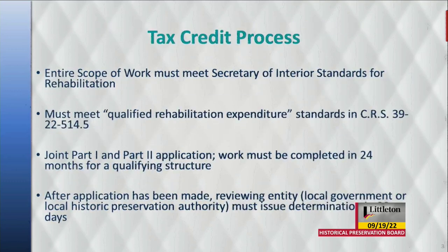In terms of the process, the entire scope of work must meet the Secretary of Interior standards for rehabilitation, and it must meet the qualified rehabilitation expenditure standards. And as I mentioned, this is a joint Part 1 and Part 2 application, and as part of the program rules, the entire project needs to be completed within 24 months.